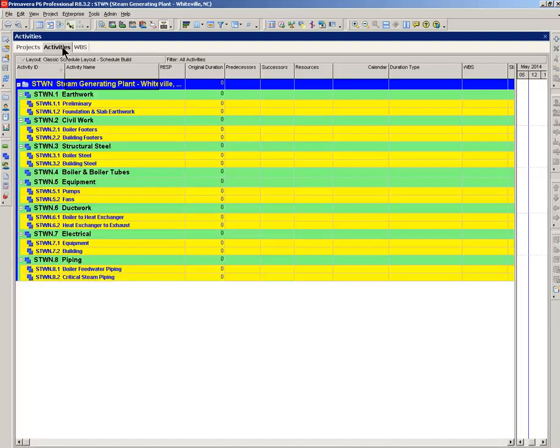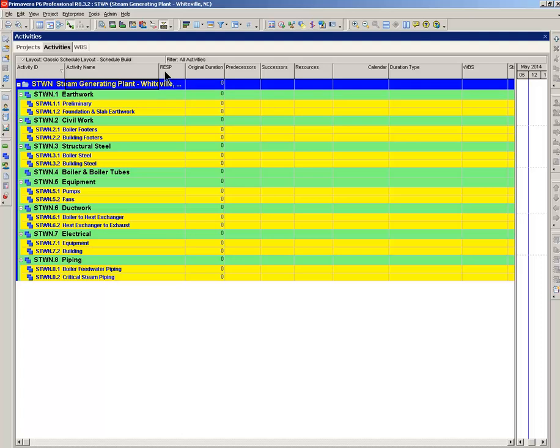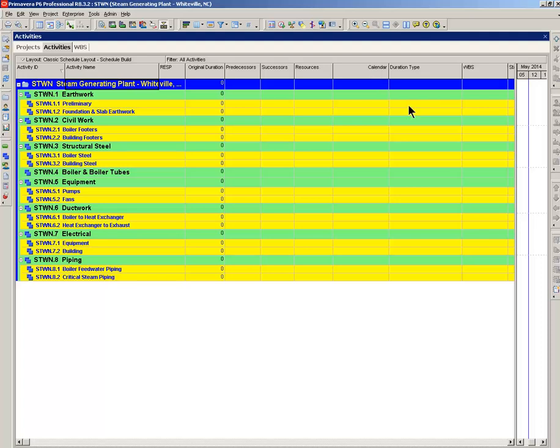Now, activities. I previously built this activity table. The columns that you need: activity ID, activity name. This one is an activity code, could be anything. This is responsibility. We'll need the original duration. Predecessors and successors, we can edit these columns to rearrange logic. We'll be adding resources to this column. Calendar, it'll show the existing calendar for the activity. We can change if we want. Duration type, same idea. WBS will serve as a check to make sure we're working within the same WBS.